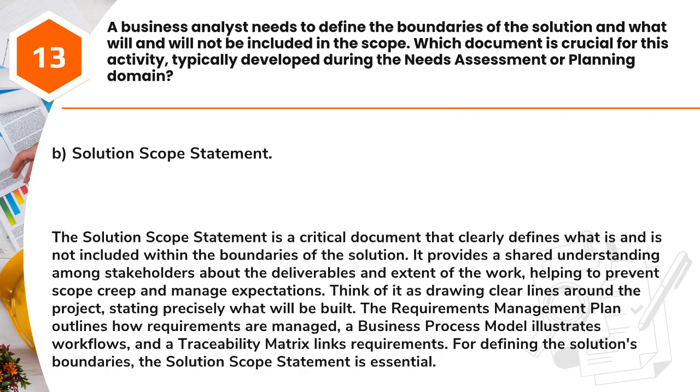The Solution Scope Statement is a critical document that clearly defines what is and is not included within the boundaries of the solution. It provides a shared understanding among stakeholders about the deliverables and extent of the work, helping to prevent scope creep and manage expectations. Think of it as drawing clear lines around the project, stating precisely what will be built. The Requirements Management Plan outlines how requirements are managed, a business process model illustrates workflows, and a traceability matrix links requirements. For defining the solution's boundaries, the Solution Scope Statement is essential.